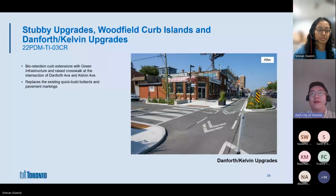So the contractors, when they do their bid, would give us one cost to construct all the elements associated with this particular location. But something that we decided to change in 2023 was that all subsequent projects that we tendered were issued as itemized contracts so that they would bid on the specified items per location as opposed to just giving us one lump sum.